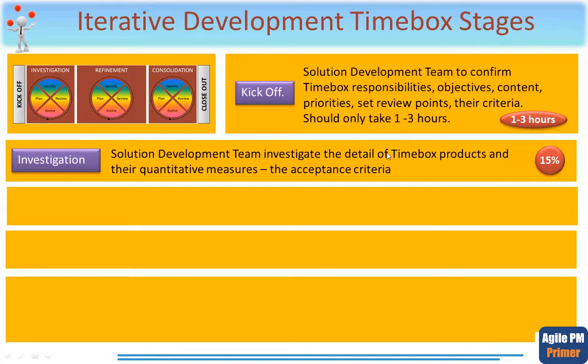The main purpose here, hence its title of the investigation iteration, is to understand the full detail of the time box work in order to meet its objectives. No more than 15% of the total work effort should be expended during the investigation iteration, which brings us to